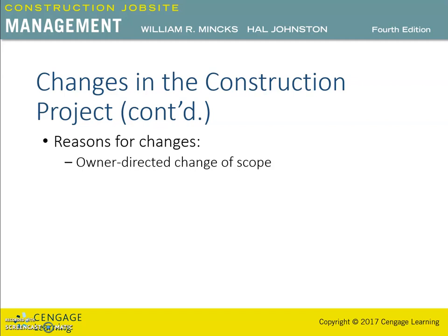A change in the scope of the work is when the amount of work is changed from that contained in the contract as indicated by the contract documents. A change order is almost always authorized for this kind of change, although the cost of the change will influence the owner's decision to accept it.